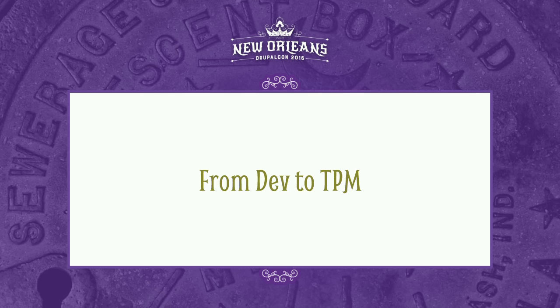And just to augment on that, I know with some of our project managers that are keen to become more technical, we get them to start doing the QA, which is quality assurance or user acceptance testing, on the more technical tickets. And the developer will take the time and write very clear acceptance criteria, which is part of our process, and it helps the project manager go through step by step. Sometimes you have to open up Firebug and actually look at CSS. And just starting to repetitively look at CSS or whatever the structure is, you gain more familiarity and you know what to start looking for.